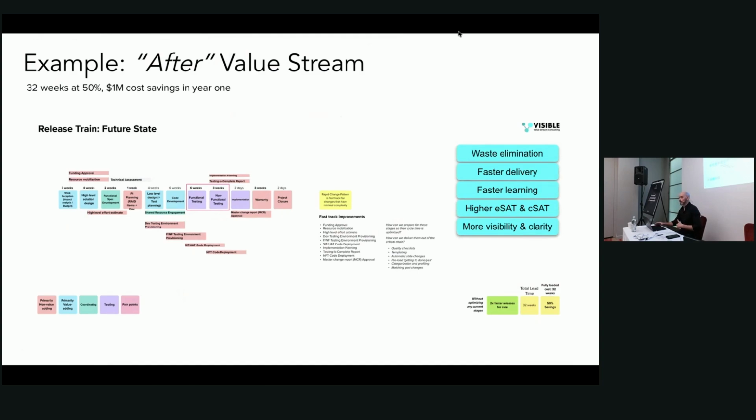So going from 64 weeks to 32 weeks, obviously we're delivering value faster. It doesn't mean we're delivering all of the same quantity, but we're getting much faster feedback and we are able to pivot if we're off track. So we typically will find we're delivering more work than ever in less time. But even if we were delivering the same amount of work or less, we're getting feedback faster. We're getting validation that we're on the right track faster. That's extremely valuable.